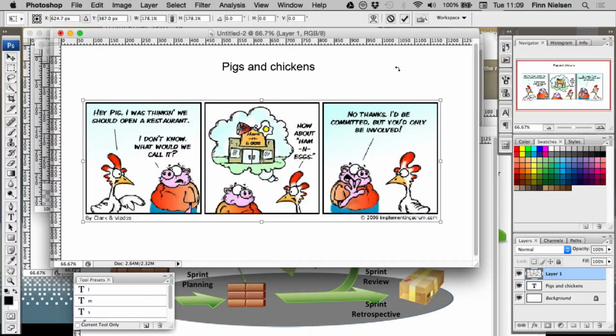and then maybe you have a manager who is the boss of those people who are working on the team. This manager is a chicken in this idea, and what will often happen is that this manager can suddenly want to have the developers work on something that he needs all of a sudden in the middle of a sprint, and this is not very good for the process if this happens a lot, because it goes across the sprint goals. But because he's the manager, they can't say no to him.